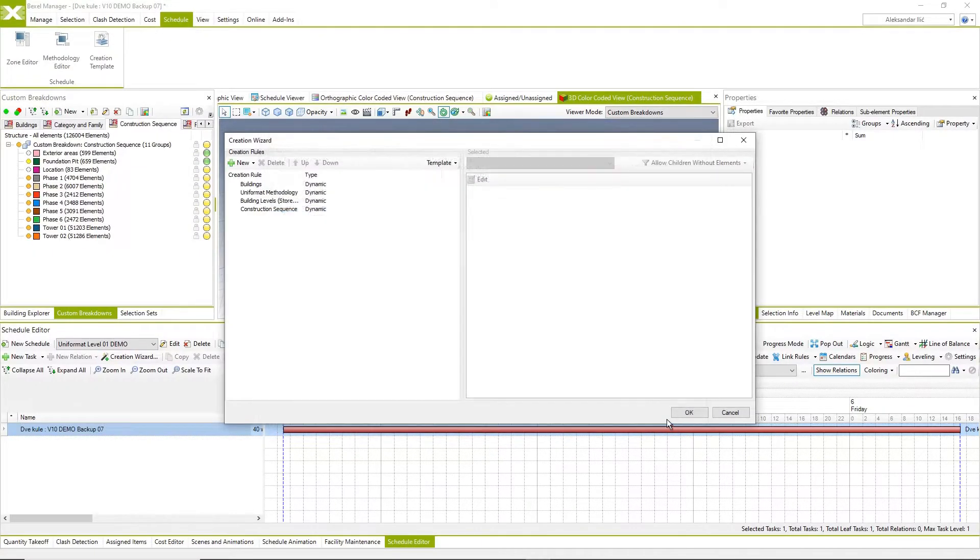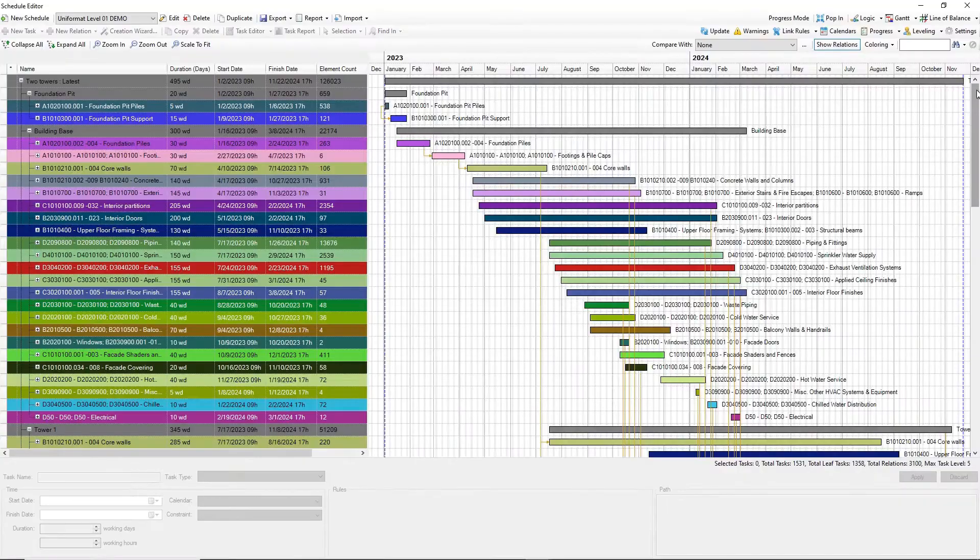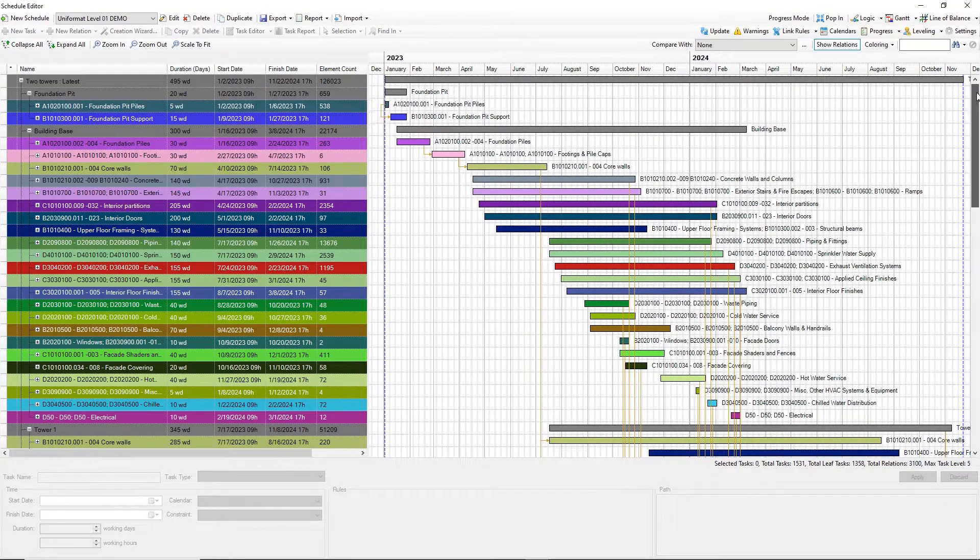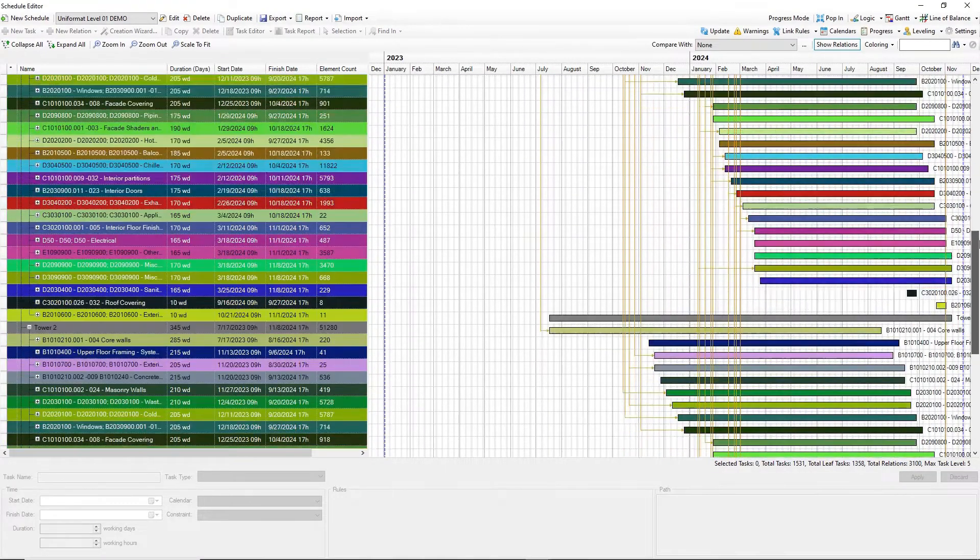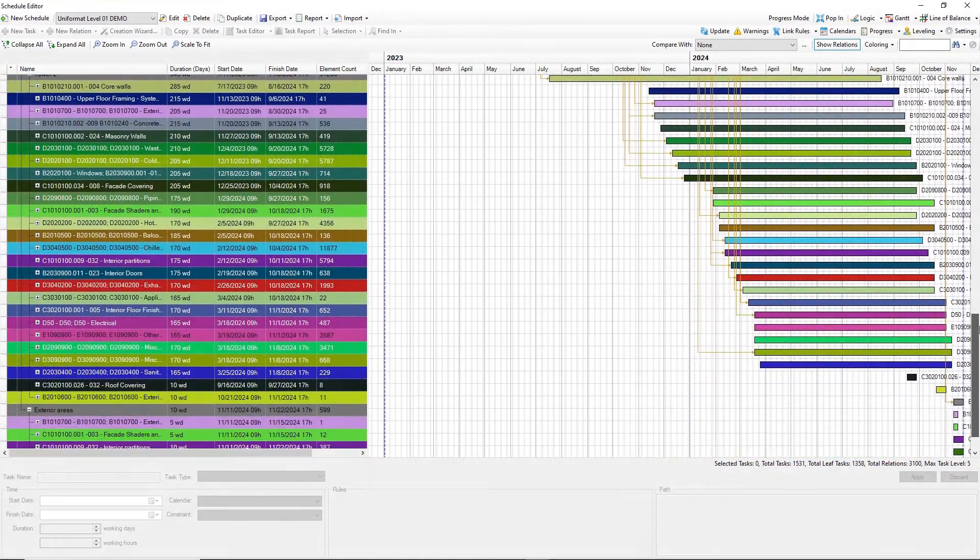Combine zones and methodologies within the creation template and automatically generate a schedule with all tasks and relations.